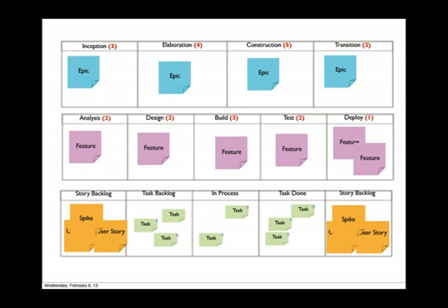But the other thing we're going to do is put work in process limits on these various queues. The challenge we're trying to face is if one of those Scrum teams down at the bottom becomes a bottleneck, that's going to ultimately block a feature from moving maybe from build to test or from test to deploy. If enough features get bottlenecked at the build and test area, that might create a blockage up at the elaboration phase or the construction phase in the portfolio.